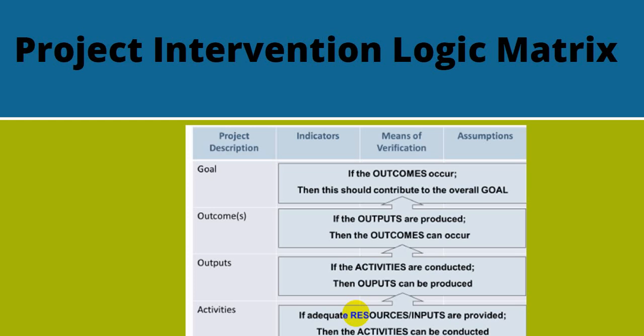Indicators are measures and observation of change. And to measure change, we need some kind of baseline measures or observations that took place before the project began. The verification of the indicators refers to the source of our measurements and observations. What kind of tools are we using? What kind of calculations are we doing? Are we using any experts that assist us in making the measures and observations? These are the sources of the indicators, and this is how we verify our measurements and observations.